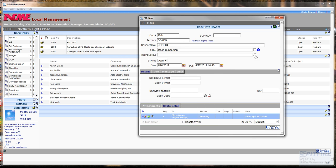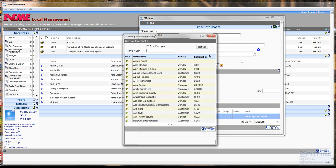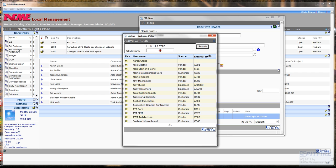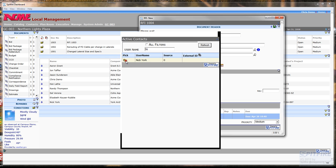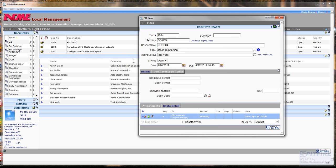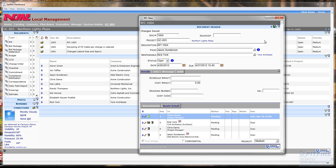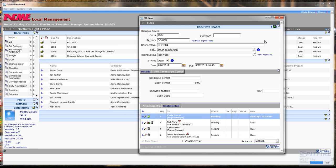And then I can also look up the name of the person who's going to take care of this issue, in this case Nick York, my architect. Great. Once I have my names, I save the document and you'll notice that based upon pre-defined rules, the individuals who need to receive and review this document have been automatically added to the distribution list.